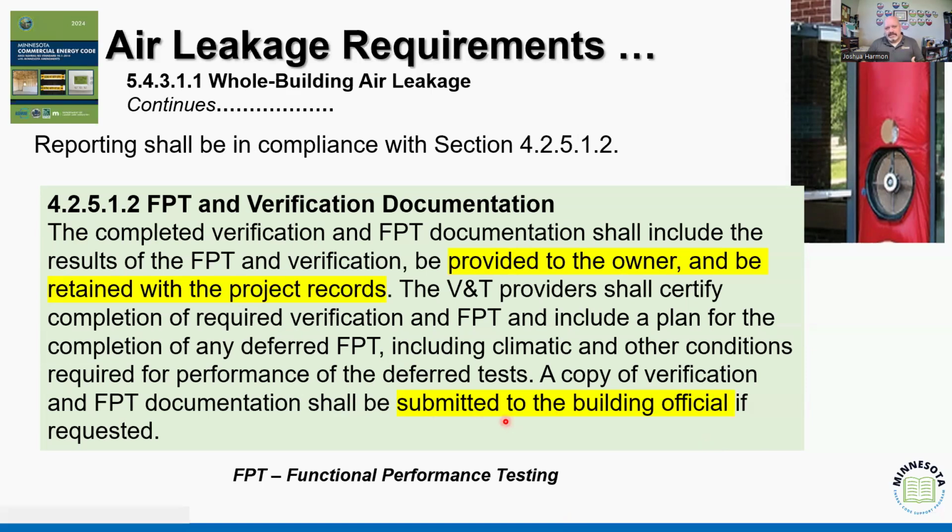That functional testing is going to be provided, so not only the building owner gets it, but also the building official, because we're basing code compliance verification, we're basing certificate of occupancy on this building performing as designed in our approved construction details.